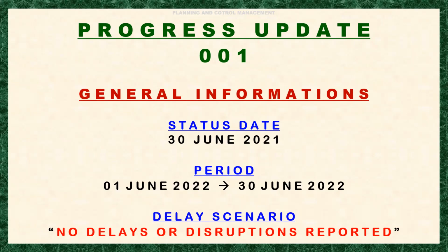The planner addresses the same accordingly prior to submission to client or owner. Or the most effective move is for the project manager, planner, or scheduler to initiate and preside over a coordination meeting to collaborate on the progress reports and address every comment, issue, and recommendation prior to submission to clients or owner.